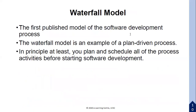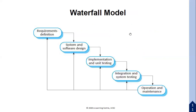The waterfall model was the first published model of the software development process. It is an example of a plan-driven process — in principle, you plan and schedule all of the process activities before starting software development. The waterfall model has distinct stages: requirements definition, design, implementation, testing, and maintenance.